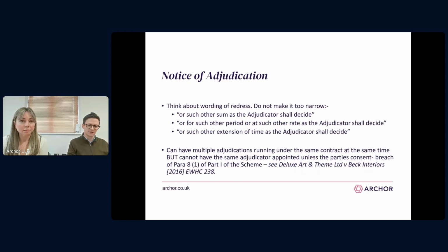And ideally you want to give him or her some scope to go outside that, because I can't really think of a situation in a valuation dispute where you don't necessarily want to give the adjudicator some latitude. Where you might not include that wording is if you've got a smash and grab type dispute and you either get the sum that you applied for or that was in a certificate or nothing.